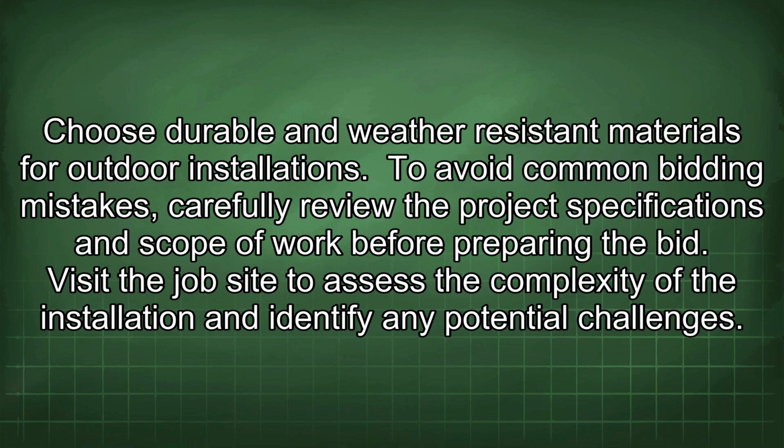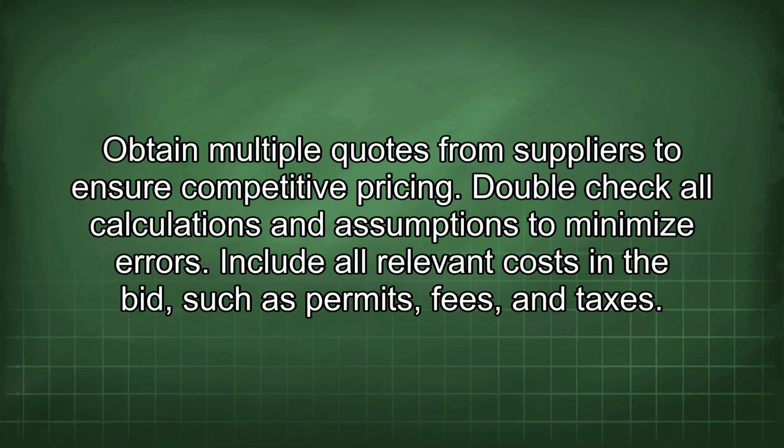To avoid common bidding mistakes, carefully review the project specifications and scope of work before preparing the bid. Visit the job site to assess the complexity of the installation and identify any potential challenges. Obtain multiple quotes from suppliers to ensure competitive pricing. Double-check all calculations and assumptions to minimize errors.